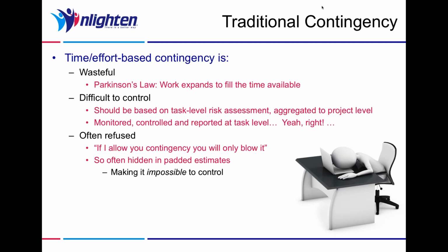Going back to the refusal of contingency, sponsors and business people refusing a contingency budget has just left the contingency going underground. So what I mean by that is estimates get padded. Yeah, I know I'm not going to get any contingency, so I'm just going to add 20% to every estimate I have of effort, and that will give me the contingency I need. But it'll all be hidden. And actually, if we hide the contingency in that way, it makes it impossible to control it. It's difficult to control at the best of times, impossible at other times.